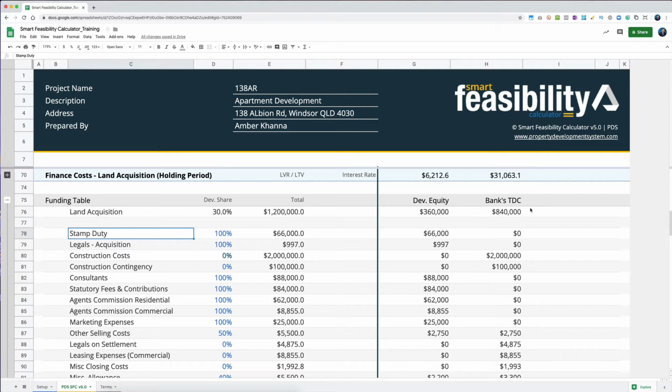They may not consider things like stamp duty, which they consider that you need to pay anyway. And if you're from Australia, if you've got GST, they will not include that as part of the cost. So that is something that you need to pay. Suddenly people think, oh, my total development cost is going to be $1 million, and that the bank will lend them 700,000, only to realize that the bank only considers 900,000 to be their total cost, and will only lend 70% of 900,000, not $1 million.